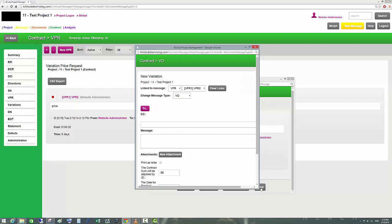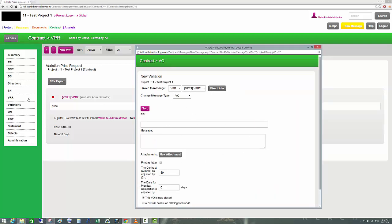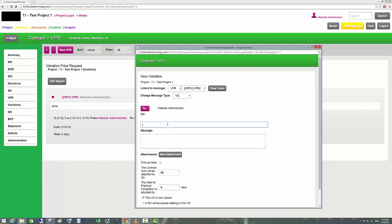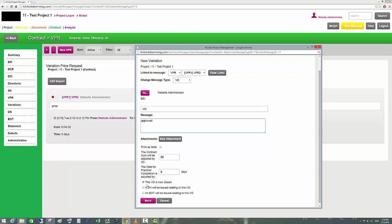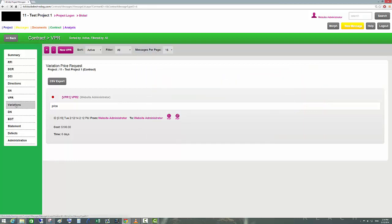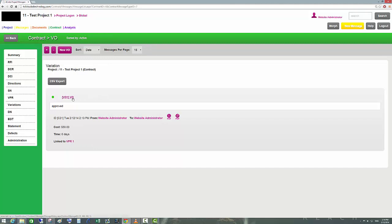We click Send and now we have a Variation Order (VO). We can send it to the person who originally sent the message. The VPR is now closed and sent. If we go to the Variation section we'll see that particular variation listed.